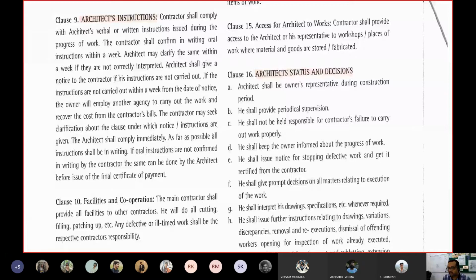Now upon seeing this shop drawing, you ask the structural engineer to modify the structural drawing, and give the architect's instruction on the second and third copy that wherever that same column will be executed, change the 6 numbers of reinforcement to 4 numbers of 20 tor in the 4 corners and 2 numbers of 16 tor in the middle. So can you find the link of the workflow?